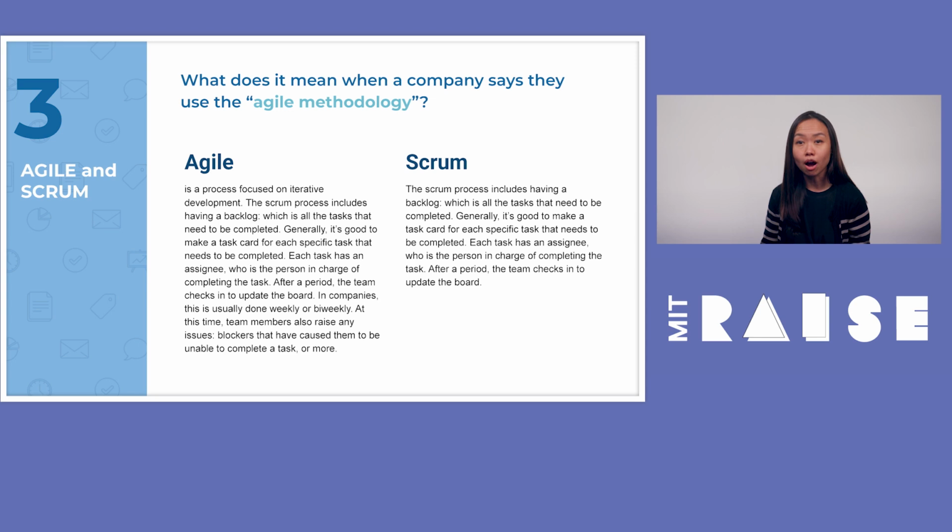development. So oftentimes people use what is called Scrum, and Scrum is this process, which includes listing out your tasks in a backlog. It includes updating the statuses. It includes oftentimes discussing with a team. In industry, you might do this once a week, but depending on your school project or the project that you're undertaking, you might find it easy to update either more frequently or less frequently, depending on your team.